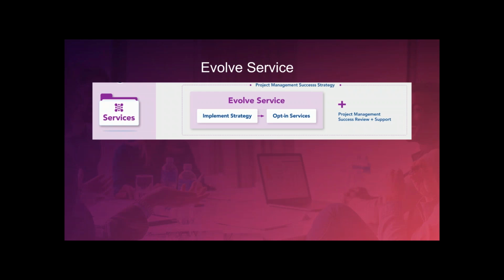Now, each evolve deployment cycle can follow the same 3D methodology as in the start: design, deliver, deploy. Establish what is going to be delivered for that particular cycle from the backlog, build, test, and verify, train, roll out, and validate. This approach has been very successful for us.